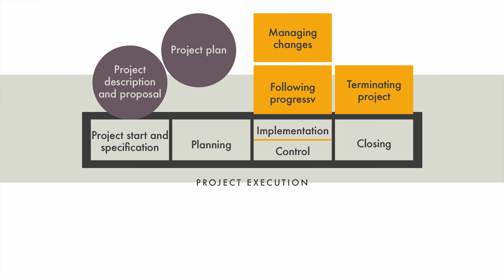At the very end of the project lifecycle, integration management also includes closing the project. At this stage, a final review of the project is carried out and it is ensured that the outcome is approved by the customer. After that, the success of the project is evaluated and lessons learned are drawn. Finally, the project organization is discontinued, after which project team members can move on to new assignments.